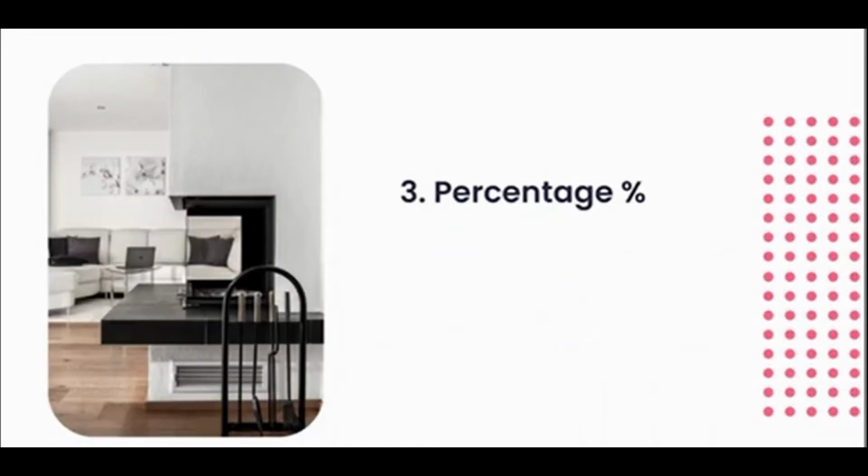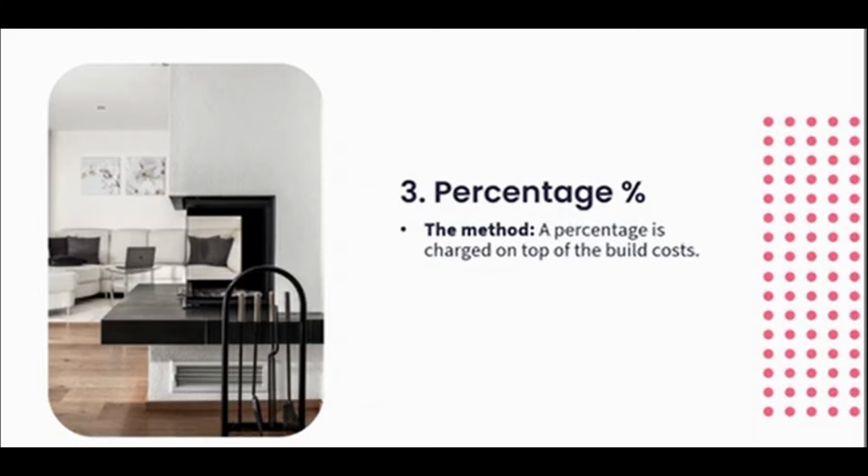Our next method of fee structure is our percentage fee. This method is adding a percentage to the final fee of work completed on the total project. So it's a percentage added to the total project fee. Charges are the net or the wholesale prices that the interior designer pays to the merchants. And then the predetermined percentage markup is applied to your final net cost. So the markup, for example, on furniture or labor is what you pay for the labor plus a percentage markup, and then that is billed directly to the client.